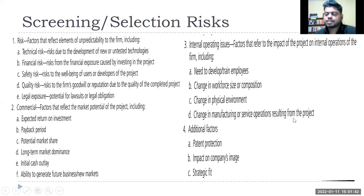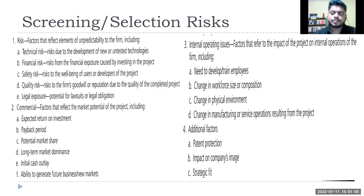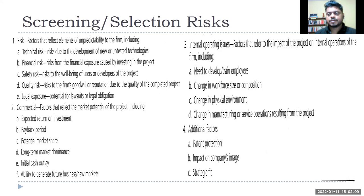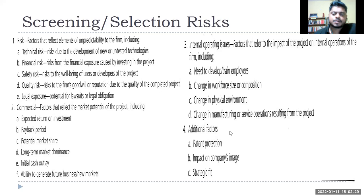Change in manufacturing or service operations resulting from the project: if you are introducing or improving a product, the plant manager needs to be informed from the beginning. It's not just about product development — at the end, the product needs to get into production and be regularly produced in that plant. If there's no assembly line or proper workforce, a manufacturing plant manager must be part of the project from the very beginning.